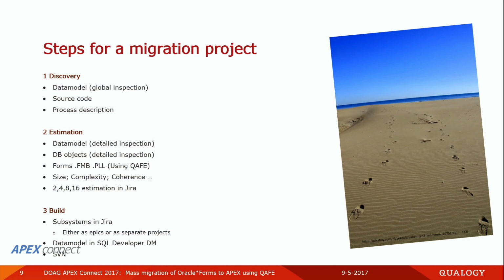And you can poke their minds for about 3 hours with what do you want with your system. We use that step to create, in those 4 hours, a preliminary offer, something about what you can expect of a project of about this size. Because the customer wants to know, are we talking about 20,000 euros or 200,000 euros?